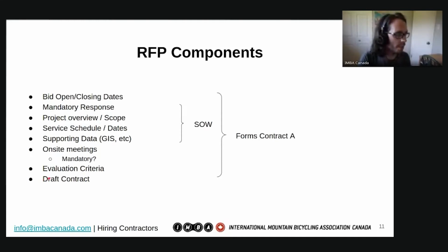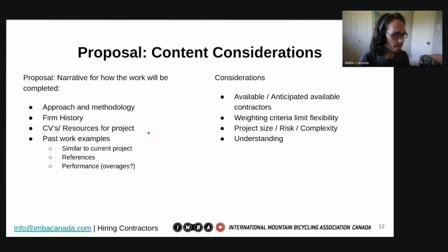And when you're working with government entities, they'll often include a draft contract and there's no real room to wiggle, especially when you're a trail contractor, because these are pretty small projects compared to what they would normally buy. But this draft contract with the Trail Association, that can totally be up for grabs. So you can offer to edit that draft contract with more favorable terms if you want.